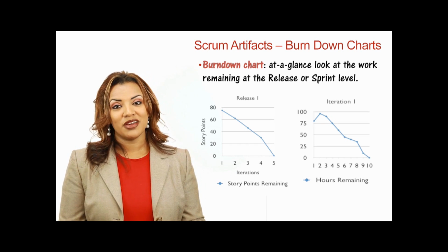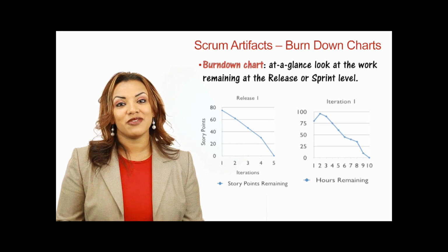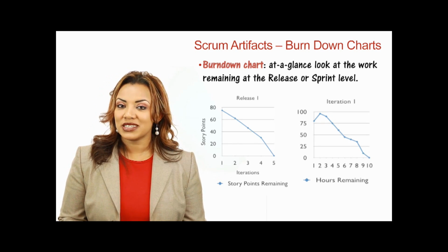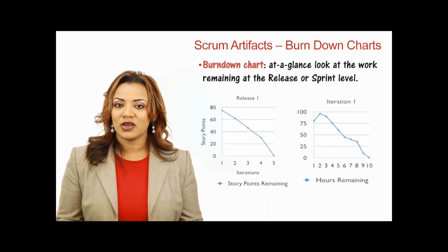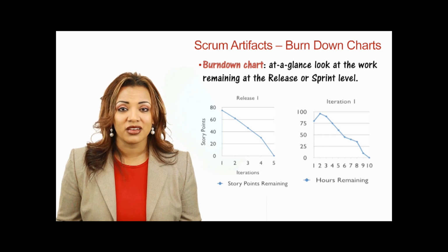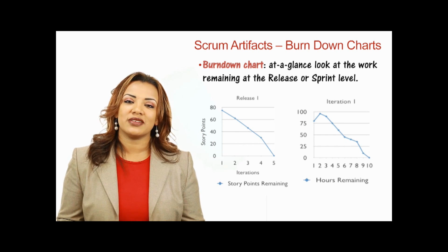Now, I will tell you that a lot of teams have moved away from looking at hours and even burning down hours. Some teams now like to burn down points, which means every day the question is, do we get any stories done? If we've gotten any stories done, then we can burn down our sprint burn down chart.